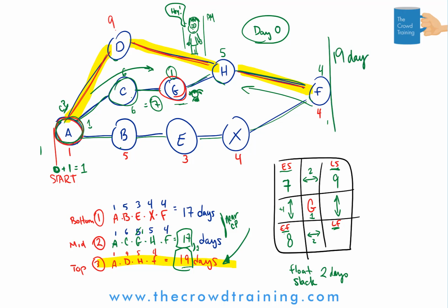So with that in mind, if we finish it on day 8, when's the absolute latest it could be finished? Well, you can do it one of 2 ways. You can go 9 plus 1 to equal 10, or you can go 8 plus 2 to equal 10. Either way, as long as we have this finished by day 10, then we have plus 5 here is 15, plus 4 here, that equals 19, and in fact, yay, party, we are going to have the project completed at said time.